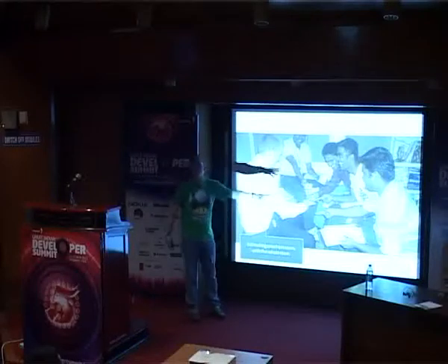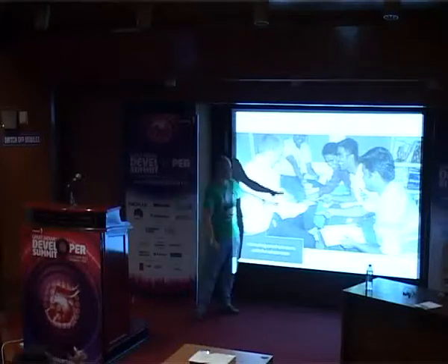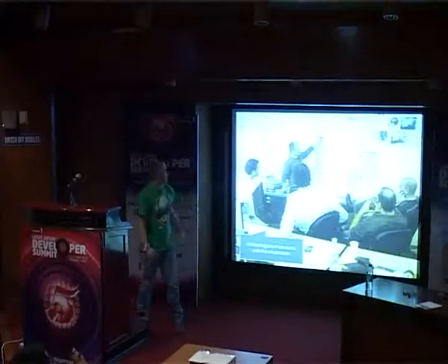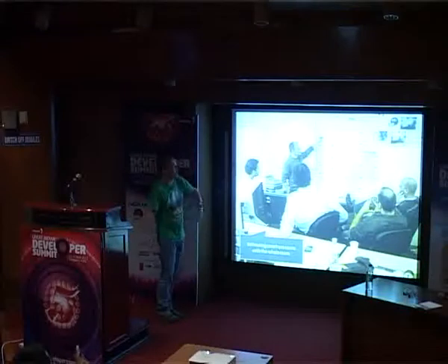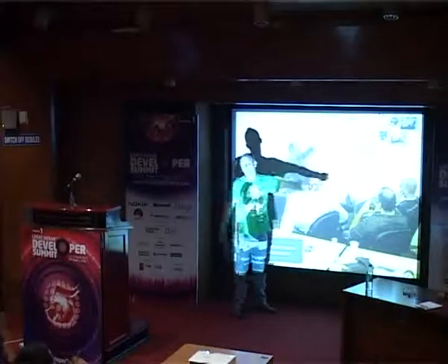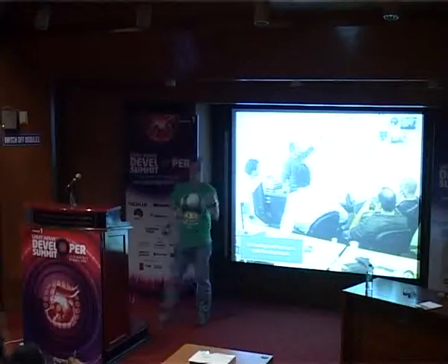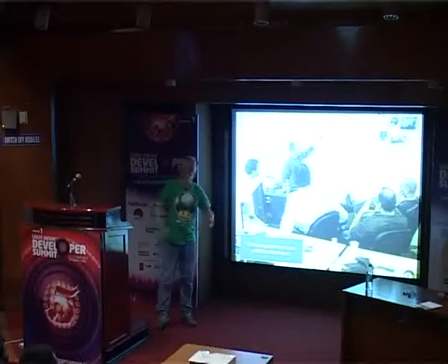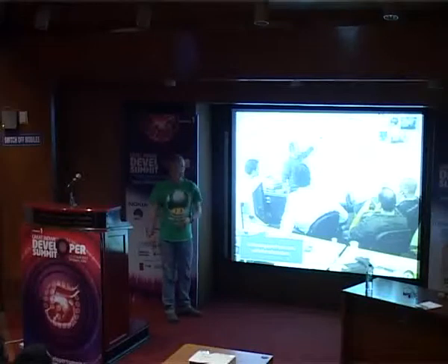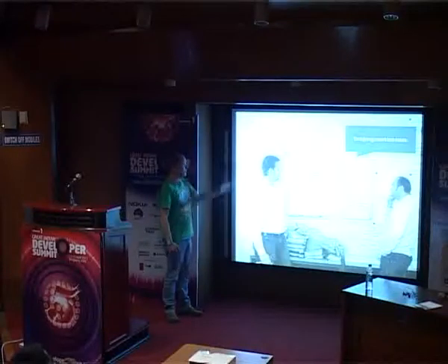So there's a scale to it. In agile projects, there's a technique called estimation poker, and we use that a lot for these kinds of estimations. You can also do it quickly, just going through the diagrams with the whole team and adding a number to it, because the scale is pretty simple. It's 1, 2, 3, 4, 5, 8, and 10. That's it. So you can easily assign these numbers to these use cases, and you will have an estimate for your project. And then we start designing them.